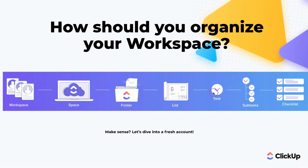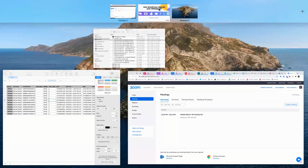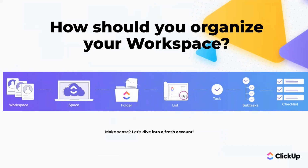Back down over here, we have tasks, and tasks must live on lists, right? So a list is a place to organize, or a bucket to hold, all of your tasks. And if those lists become super complicated, your projects become expansive, and you possibly need multiple lists to contain them all, you can certainly organize lists into folders, though that is not a requirement. Folders are an optional component of your workspace hierarchy. So we have workspaces broken down into spaces, broken down into maybe folders, but definitely lists, and then tasks.